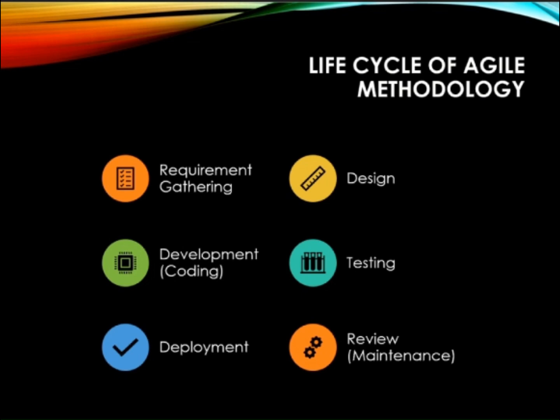Suppose in sprint one, we develop login and sign up. Second sprint, cake catalog and screen built. Third sprint, cart and payment gateway. So here front-end plus back-end development happens. Now our fourth is testing. The tester tests the app to find bugs and make sure it works as expected. Does login work with correct credentials? What happens if a wrong password is entered? What happens if payment is stuck in between? So manual and automation testing can be used here.